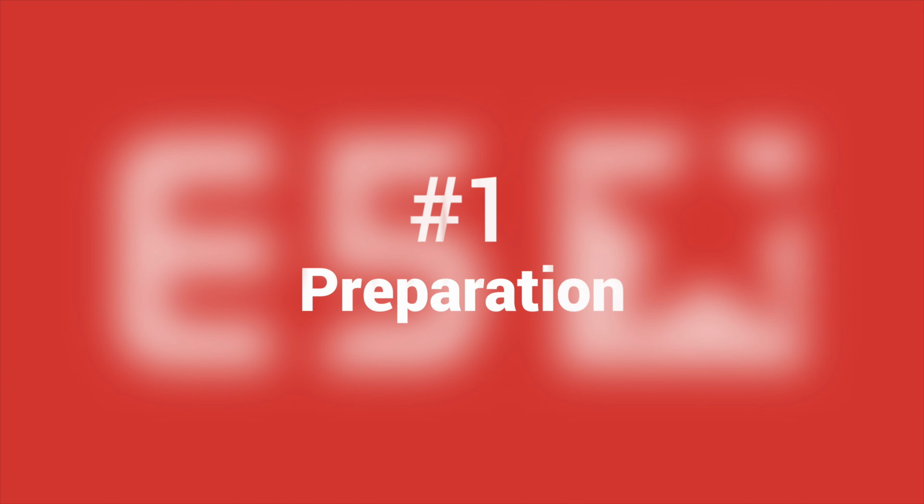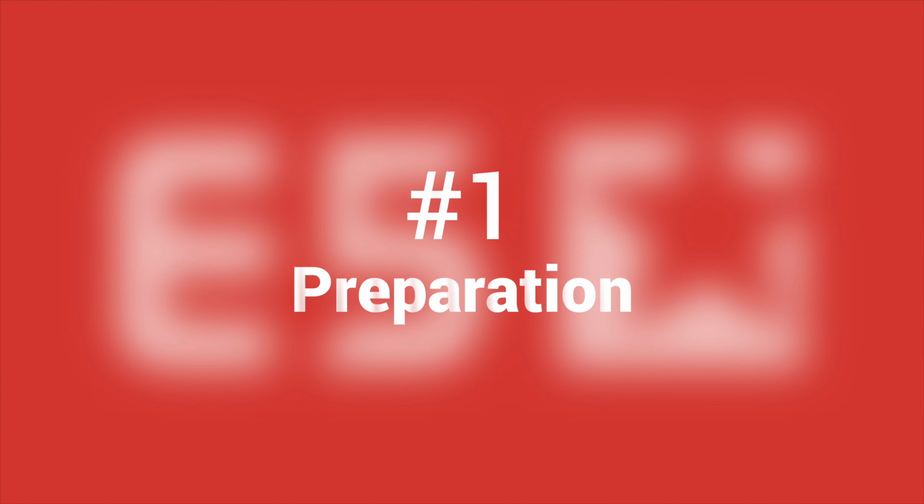Building Safety Regulator. Number 1, preparation is key. Make sure that your consultants or you are fully aware and know the requirements for the application, i.e. the information to be submitted. Make sure the information is clear, well labelled, plans and layouts, technical reports. Make sure you've got competency evidence for your consultants and personnel, and make sure that compliance statements are in there and well written and well considered.